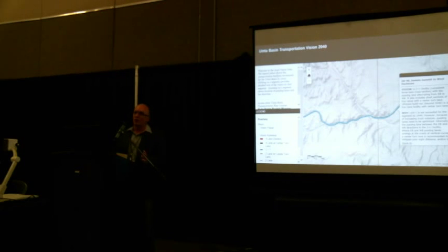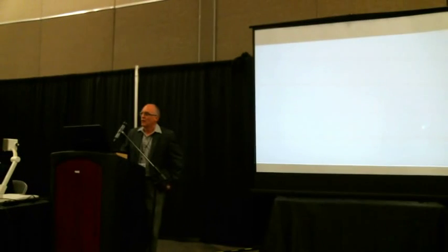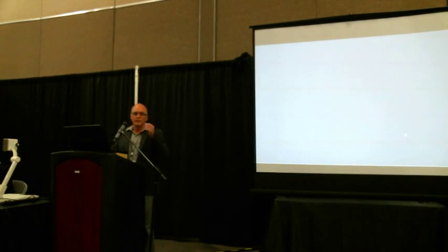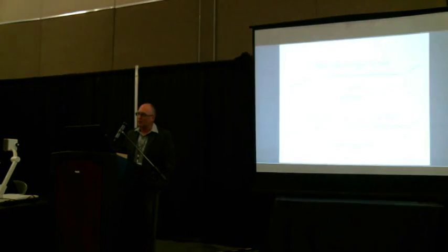This type of facility is also a great transition between a typical 2-lane rural and what will eventually be a 4-lane facility. So it kind of works as that transition. And our recommendation for the timing of it was do the 2+1 by 2040, but then beyond 2040, you'll probably need the 5-lane section. Of course, listening to what Carlos was saying about autonomous vehicles, by the time 2040 gets here, we may not need this at all, but we had this for the ultimate build out.